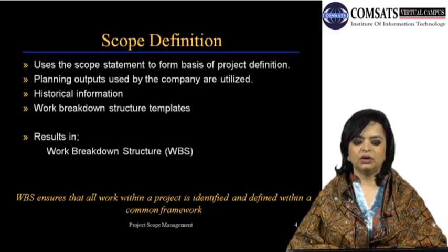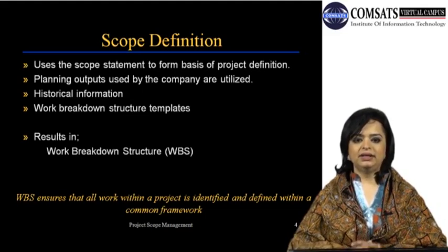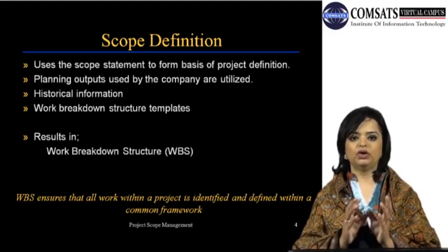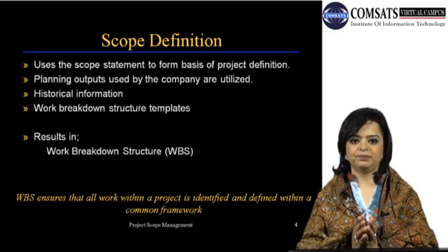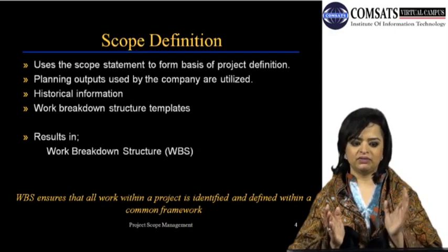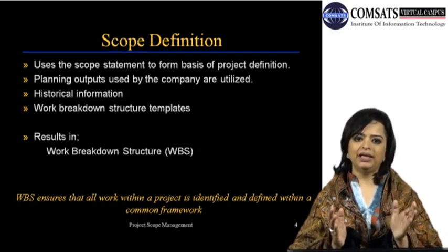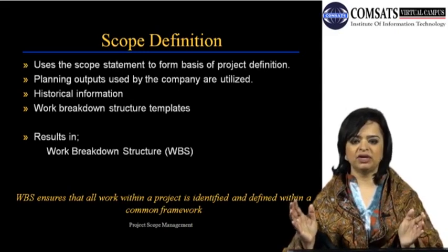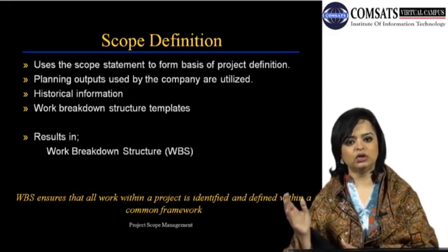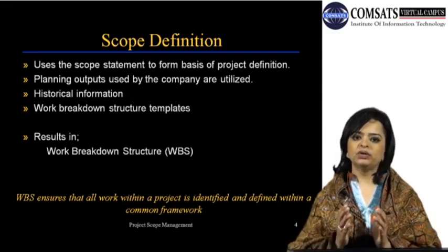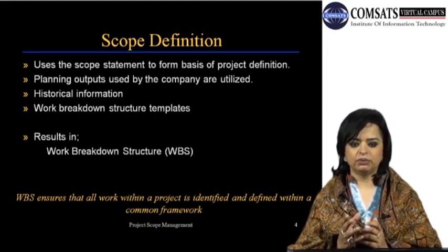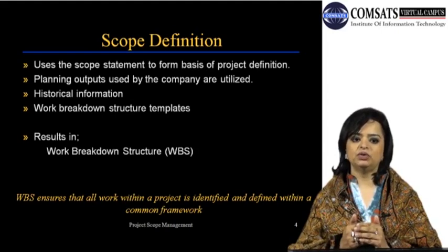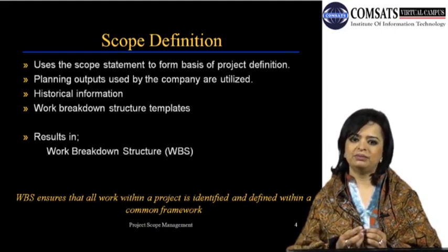breakdown structure. Bottom line is the WBS is taking the initial scope, the scope as defined and identified at this point in time, and breaking it down into activities that will take the project from point A to point Z, from the initiation phase to the initial activities to the closure activities, making sure that all activities are grouped hierarchically into more manageable components and should always be taken down to the level where individual resources can be assigned to it.